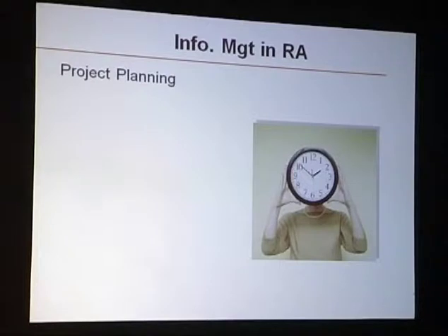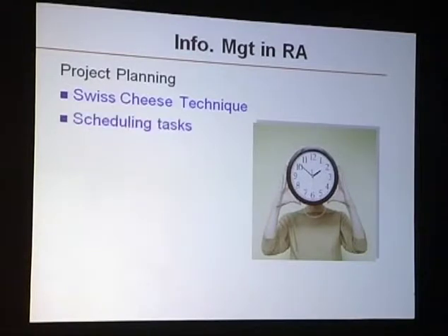So information management in regulatory affairs really depends upon how well you plan your submissions, how well you are able to structure the entire task. You have the entire task broken down into, say, 5 or 6 different elements, and then start designating those, scheduling them, deciding the priority status of these, and then have the different groups which are responsible for doing those activities, have those meetings with them.